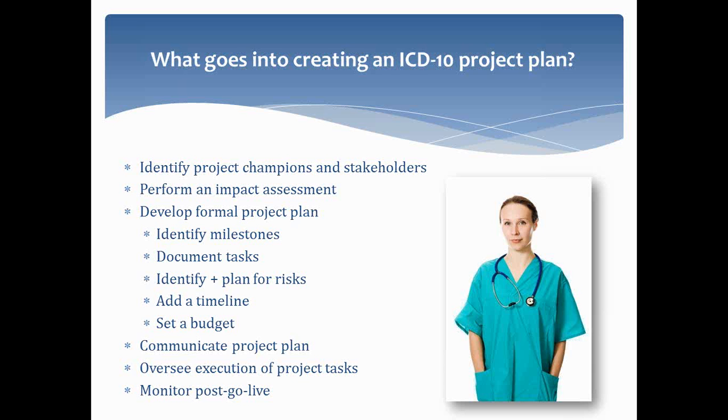Another area that you might want to plan for in terms of risks is external systems preparation, whether that be your vendors, your payers, your lab companies, whoever. You can never be sure that everybody's going to get it right at the exact same time. So make sure that you know when your code set is going to be available in your practice management system and in your EMR, and how it will be maintained. Check with your clearinghouses, and make sure you understand what their timeline is.